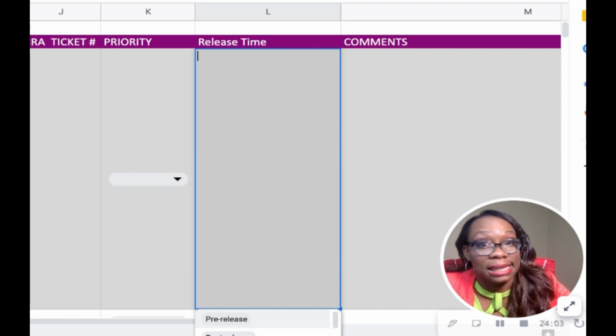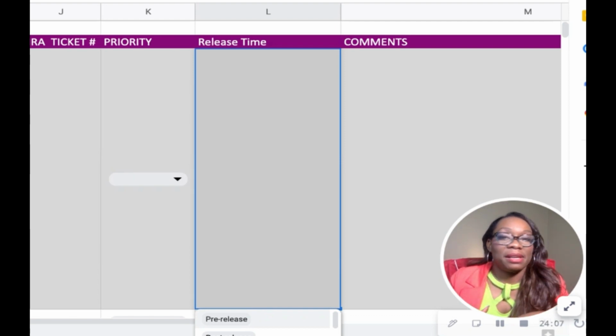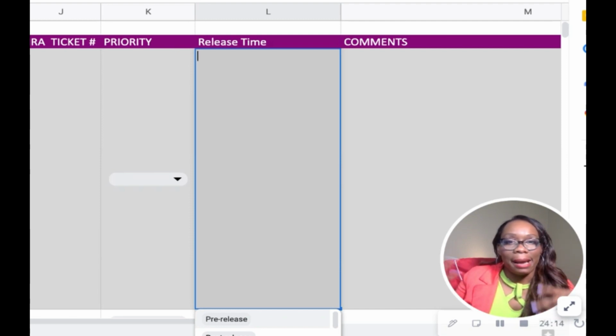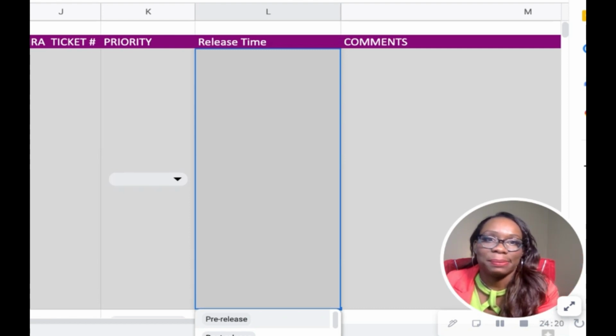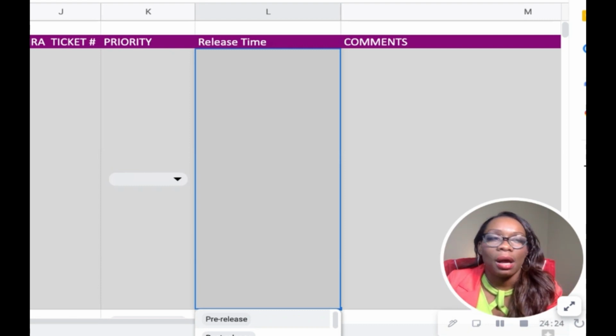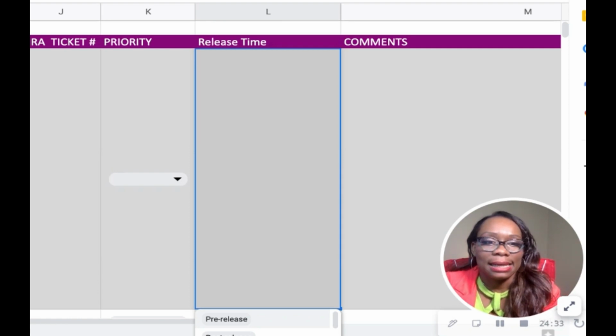Or we can release this thing and fix it while there's some time before people will adopt it. Maybe you release something, but not everybody uses it right away. Maybe there is a ramp up time for them to implement the new version or the new release number, or there's some time in between, maybe like a 2 week span. So within that 2 weeks, they can fix that bug and then they'll see the newest thing. Or we'll release it knowing it's not fixed, but we'll send a patch out very shortly after with the fix. And that's how we plan to handle it, right?